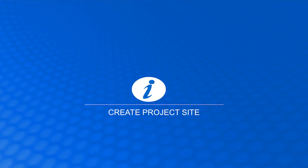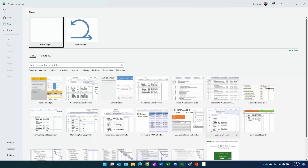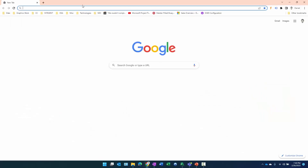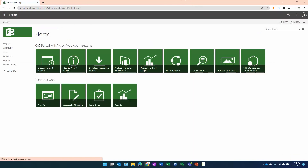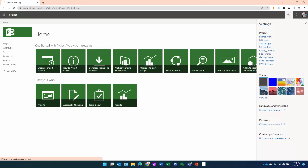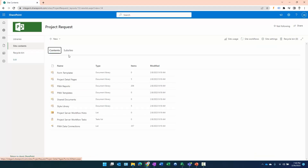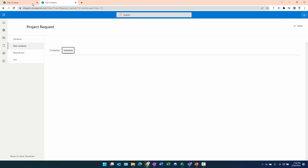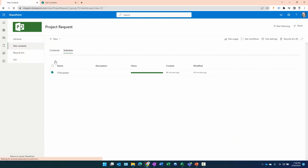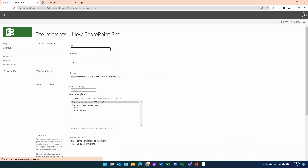Now we're going to create project sites that will be used as templates for these EPTs. To do that, we're going to launch into our project request instance, go to Settings > Site Contents > Sub Sites, and create a new sub site. We'll need to do this twice, so let's create the first new sub site.